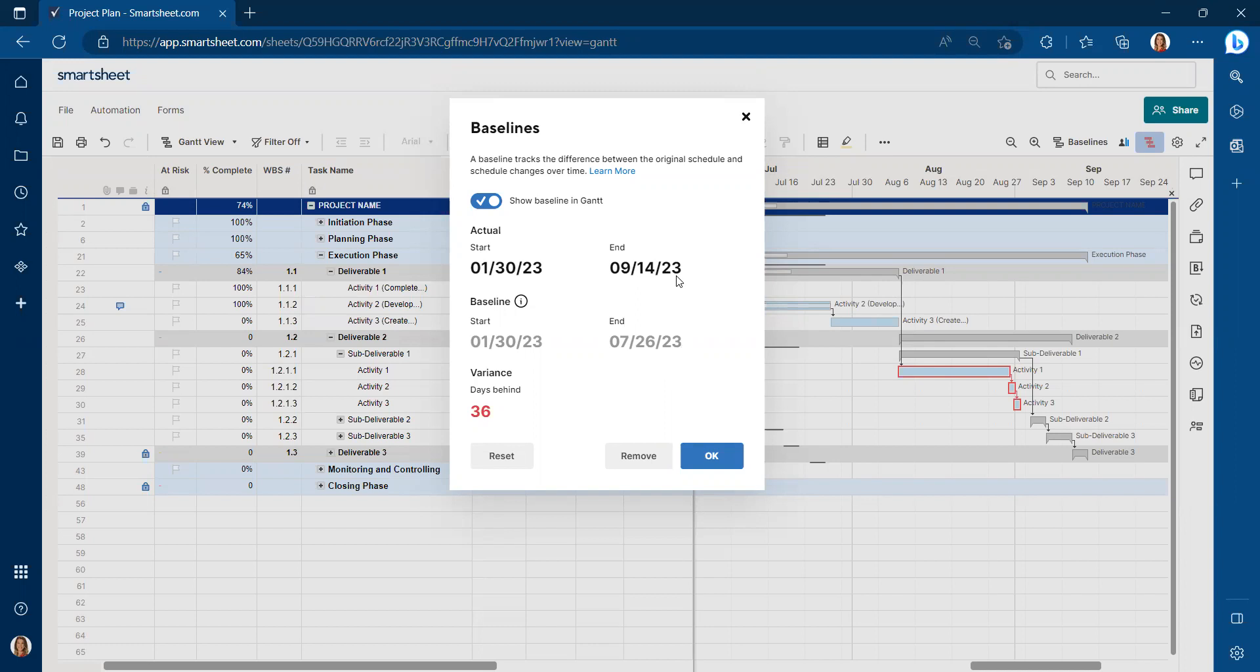Obviously, for those of you watching right now, these dates are in the future. This is also a good tool for scenario planning. So if you're looking at specific scenarios, what if this activity or task delays by 20 days, what's going to happen? Your baseline can also be valuable in helping you with that scenario planning.